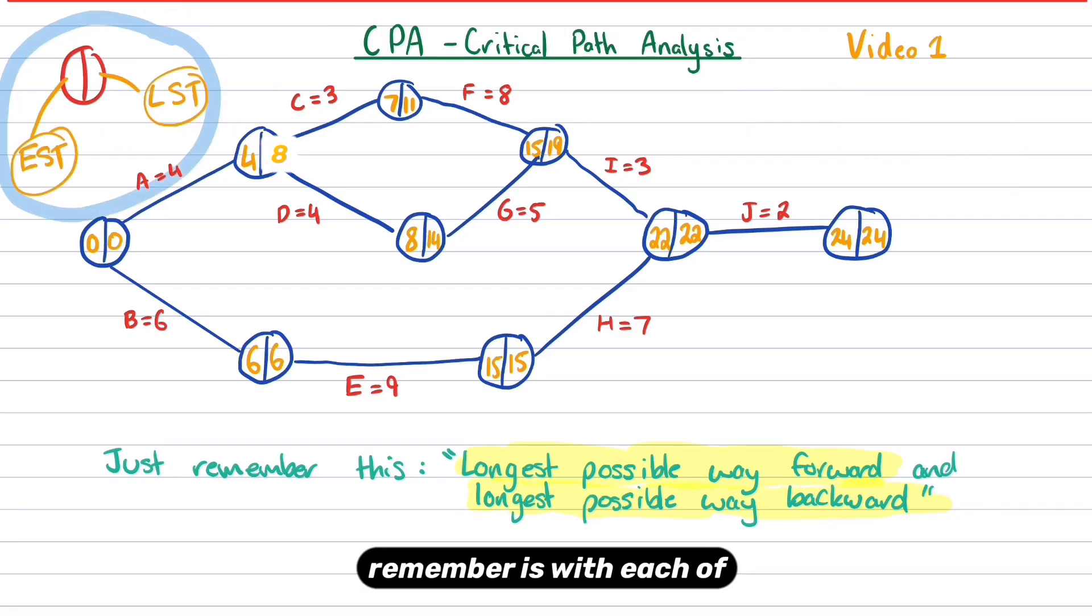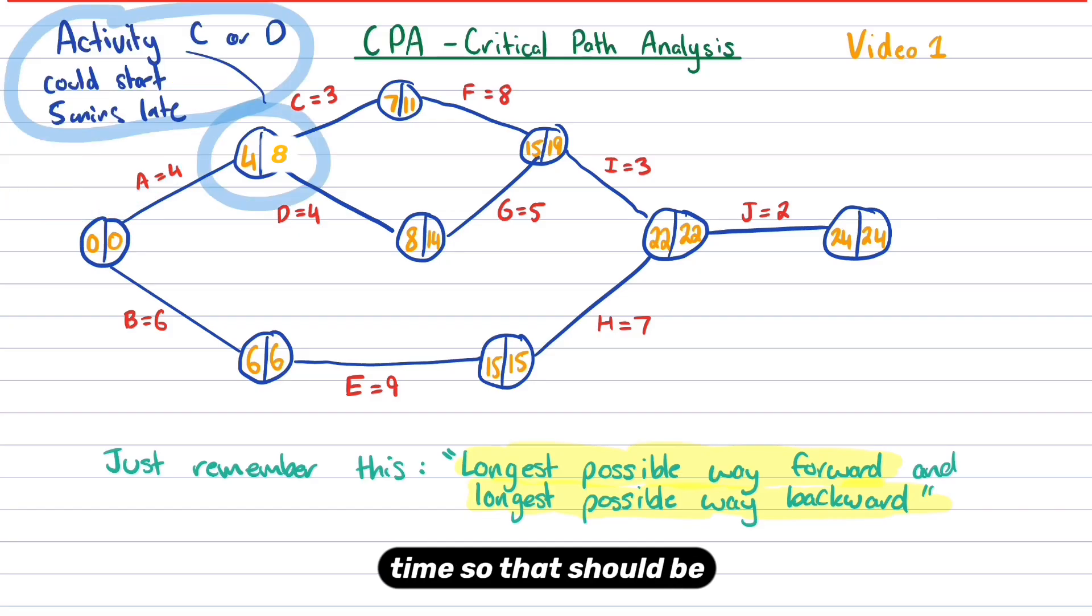So something important to remember is with each of these nodes, what these represent on the left, it's the earliest start time. And on the right, it's the latest start time. So that should be four and eight, right? So what that means is that for activity C or activity D, they could technically start four minutes late, not five minutes. That's a typo. They could start four minutes late and it wouldn't really interrupt anything. So if they rocked up and they completed the task three minutes late or four minutes late, that's okay because it's not going to interrupt the whole activity.